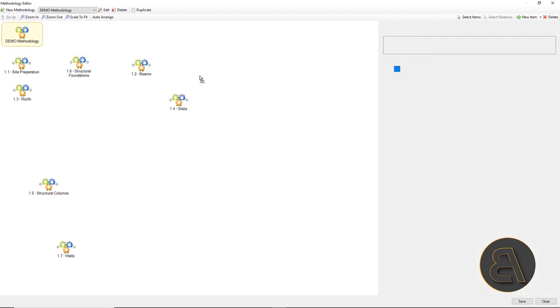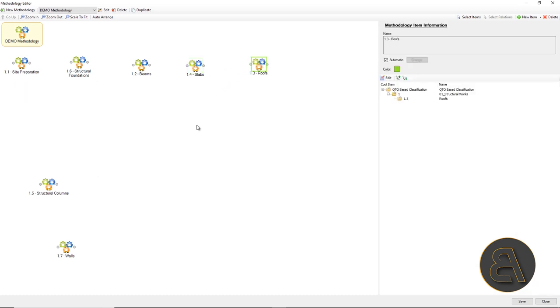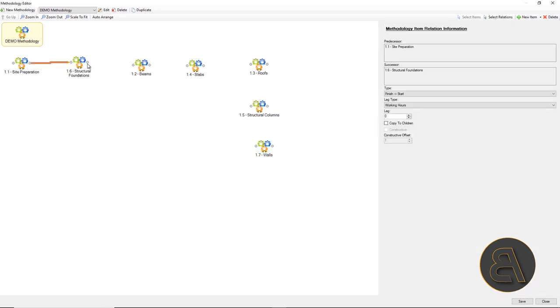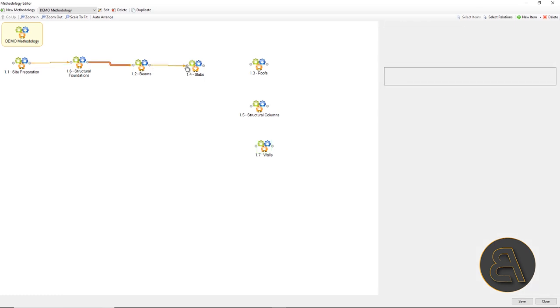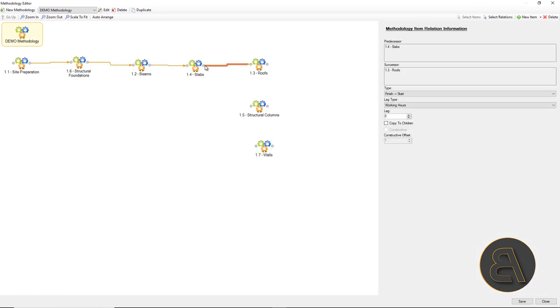By simply dragging the mouse, a relation is created, which needs to be detailed in more detail after fine tuning if necessary, connection types, lag, and similar options.